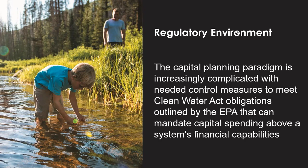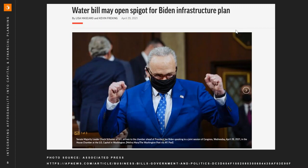The capital improvement component is often subject to change because of level-of-service decisions, asset management decisions, or responses to changes in the regulatory environment at the federal, state, or provincial level. For example, in Florida we're looking at a potential bill that would eliminate surface water discharges from wastewater plants, which would obviously affect a lot of capital improvement requirements. That's just one example of the continuous stream of impacts to capital planning.